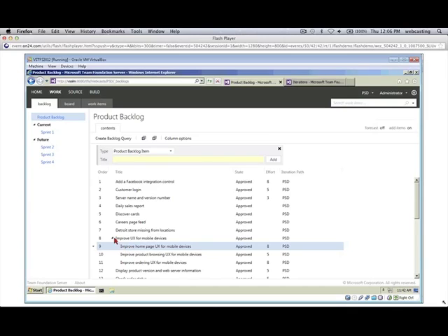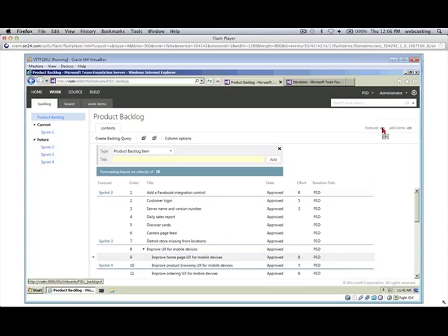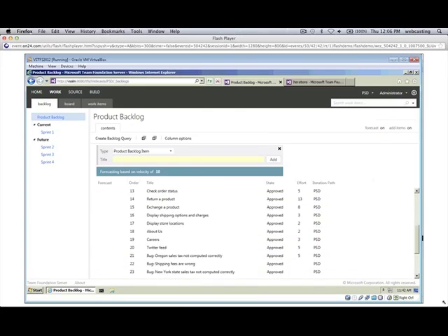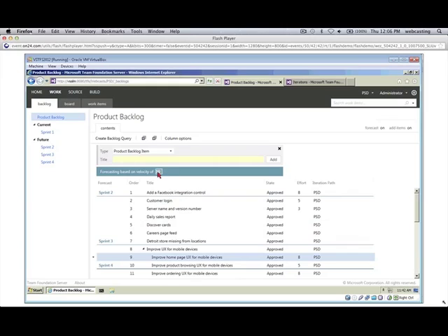That's nice. The other thing I wanted to show you in here is you can turn on forecasting. So if you've got these guys estimated, and on down, the tip of the iceberg has been estimated down so far, then you can say things like, hey, given a velocity of 18, it's putting these lines on here saying, well, okay, we think we can do this much work in sprint 1, and a lot of this is because I didn't put in efforts for that, so that's a little bit off.